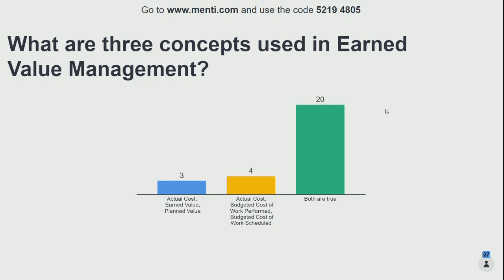One of the drawbacks of earned value is people are incentivized to give you positive reports. Another point about how much work has actually been done: if you were to go on site or go to the facility where the project is taking place, sometimes people are incentivized to give you the positive spin, the really optimistic view of the project. No one wants to look bad in front of management. And also people have their performance development review, their PDR, linked to performance objectives in their role. And if their project is behind schedule, they won't get their bonus.